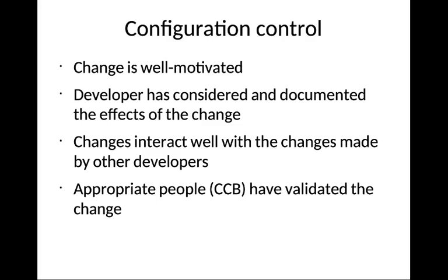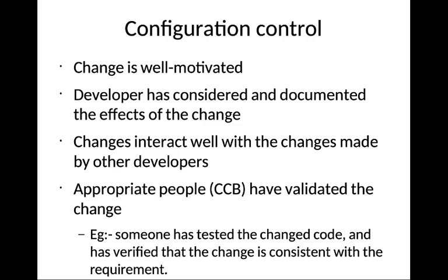Then the change will be reflected only after the appropriate people, or the CCB, have validated that change. Then a new baseline will be created.